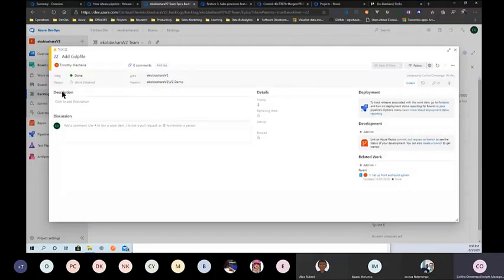Yeah. So when you're coming to plan your tasks, there is this part, activity, very important. So how do you classify that activity? Is it a deployment? Is it a design? Is it development, documentation? Is it requirements collection? Is it testing? Things like that. So it becomes a little bit easier for you to classify and plan your team's sprint based off of this.